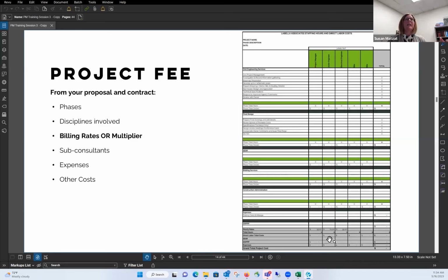And then the best way to build trust and confidence is to engage early. With New York State DEC or Pennsylvania DEP, the earlier you reach out, or your client reaches out, and say, these are the things we're looking to do with this project, can you tell me if there's anything that is a red flag?